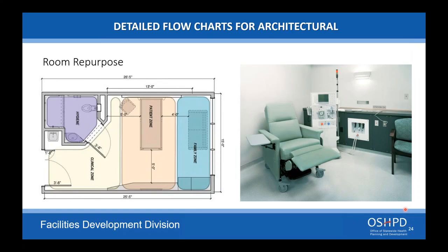If you're taking an old patient room here on the left, and you're going to convert it to a dialysis room on the right, again, define the scope. Okay, what is the scope of the project is really within these four walls. Okay, we're assuming everything's going to be edited or demoed out, and the new stuff's being put in.